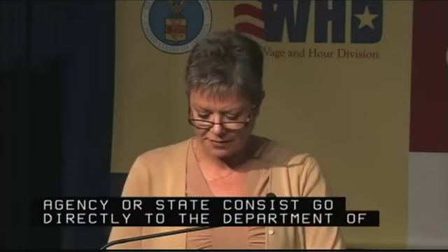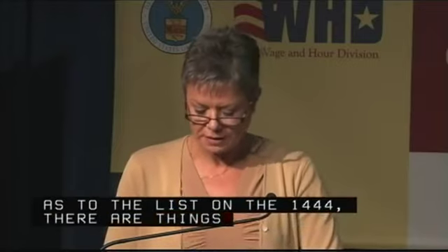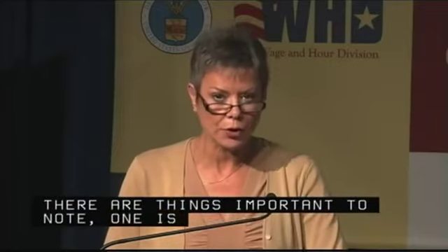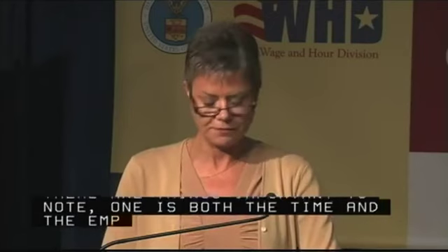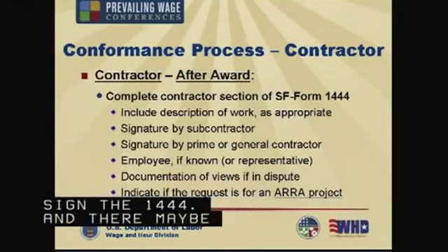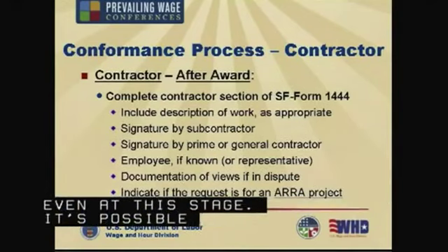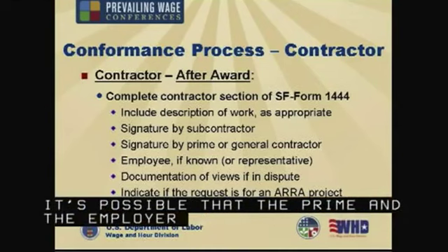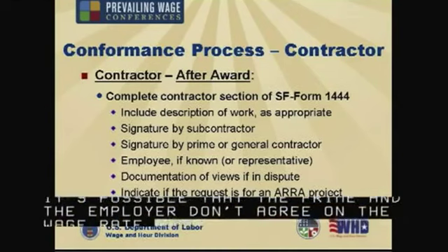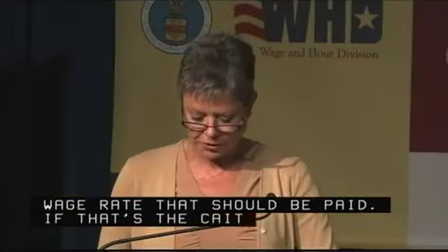As to the list on the SF 1444, there are some things that are important to note. One is that both the prime and the employer are required to sign the 1444. And there may be a disagreement even at this stage. It's possible that the prime and the employer don't agree on the wage rate that should be paid. If that's the case, you'll need to collect the views from both the prime and the employer and consider that in your review.